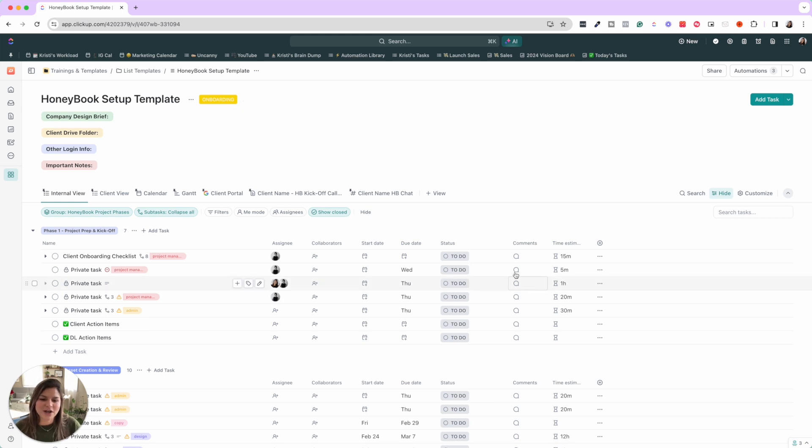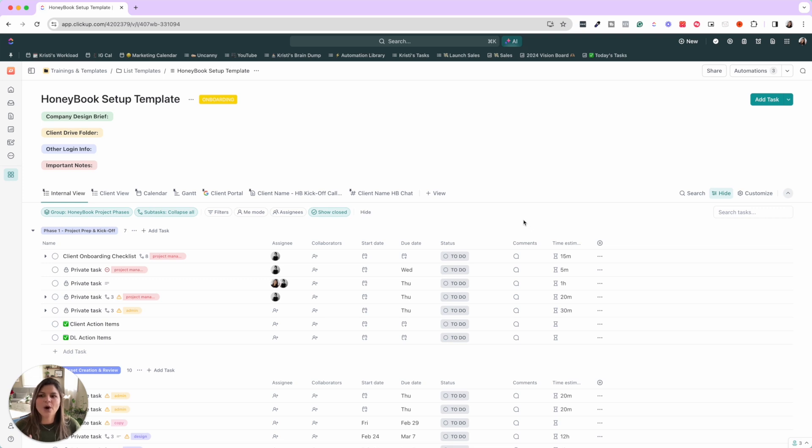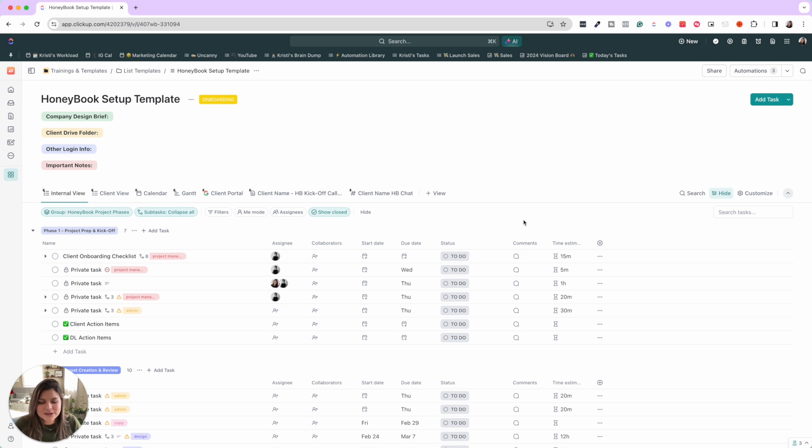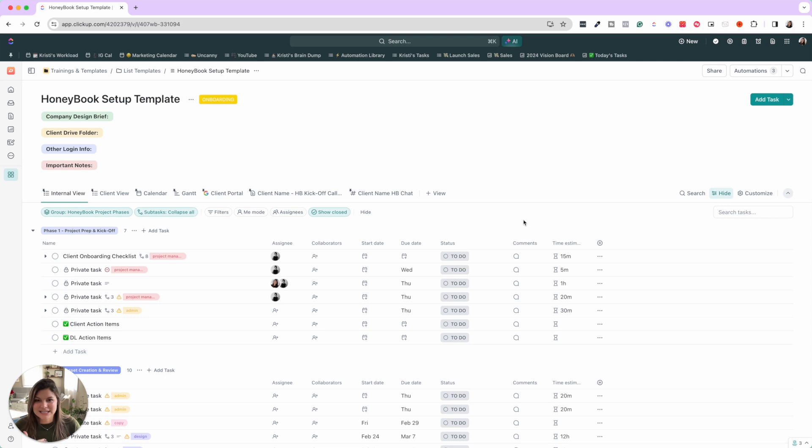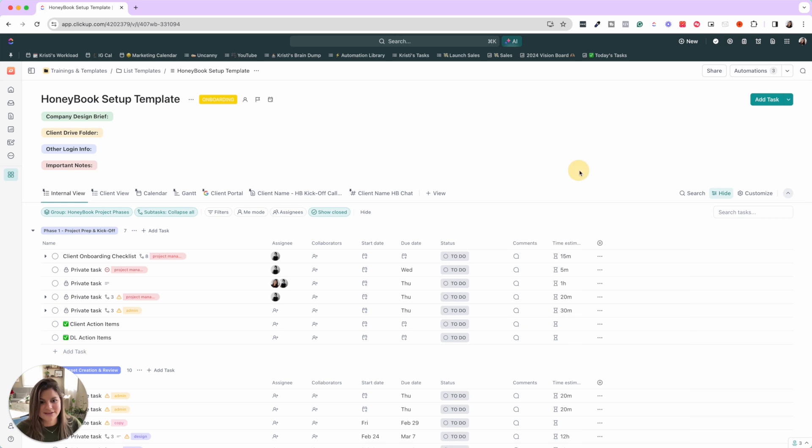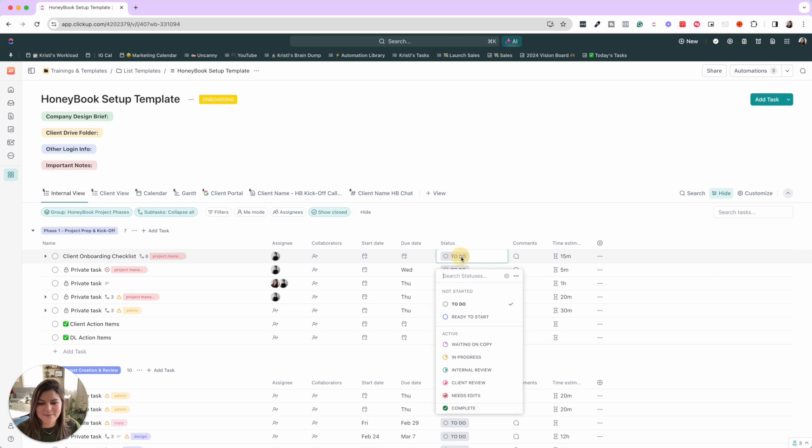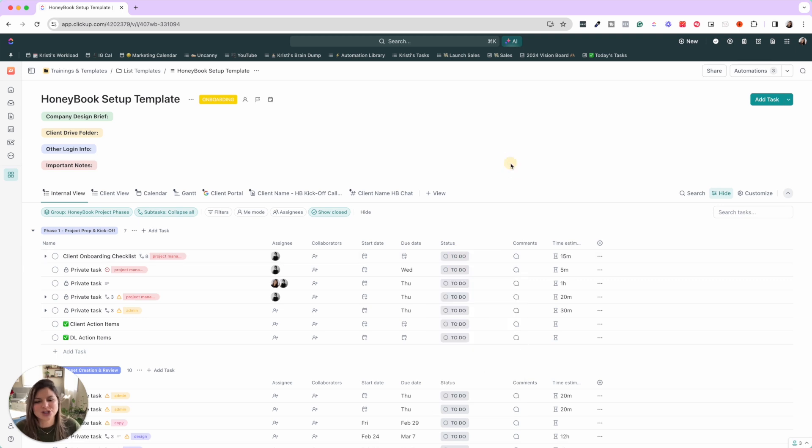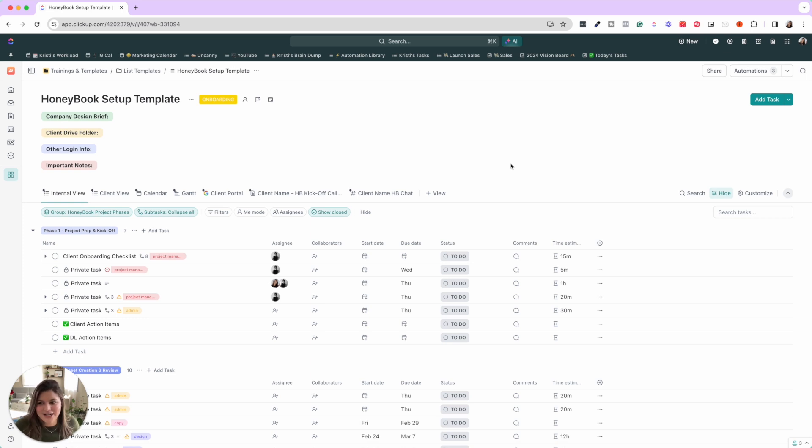Even I just had this call with her about how sometimes things will get stuck in client review. And we want to know when we have followed up with that client, when she has followed up with them and how many times. And then if it's past two or three times, then we move the status to client delay. So we're going to add another dropdown that's like client status. And then that will have like follow up one, two, etc., because we don't want it to be in the general statuses. So totally make this your own. This is to give you inspiration and show you how we actually map out our process.